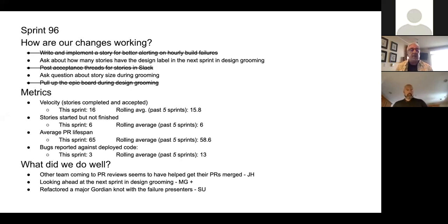They keep track of them by putting them up into this section. And each time we get to a sprint retrospective, they say, well, what about this one? Did we do it? Did it work? Was it good? Is it in there? Should we keep paying attention to it, or is it locked in and we're just going to keep doing it? And so as things are retired from this list, that means that they've sort of taken their place within the team's processes, and that's what the strike-throughs are.